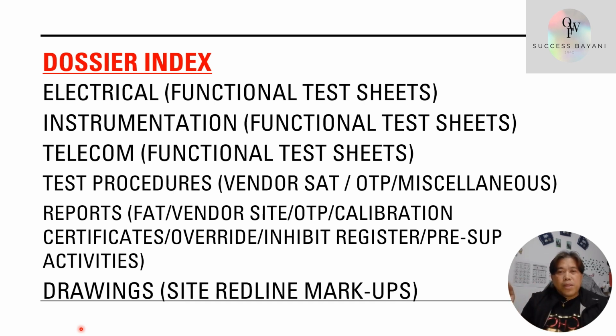Then you need to submit, and any comment from the client, or if you are the client you comment whatever you found, any missing documents to be required to submit, then inform the contractor so that it will update through online or actual submittal. It depends. All right, it depends on the project where you are right now. So this is the whole example, guys, for our RFHO, for our dossier index.